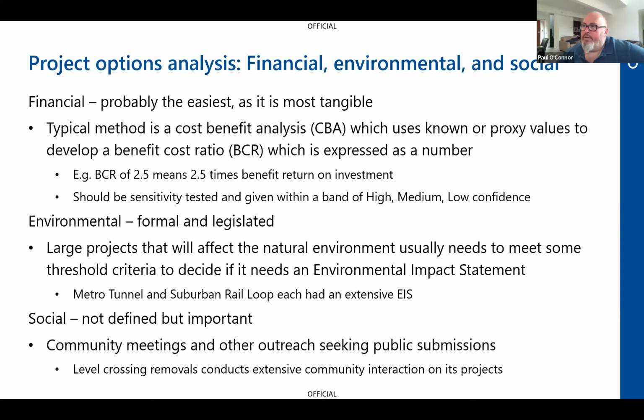So that's the financial, and the other one that I've had a bit of exposure to is environmental. I think what's important for both the private sector and the public sector is that environmental appraisals are very formal, and they're usually requirements under legislation. And often there's multiple pieces of legislation. So you might have federal legislation, state legislation, and you may even have local government requirements. I think a lot of people forget that you can't just do a project without getting those environmental sign-offs.